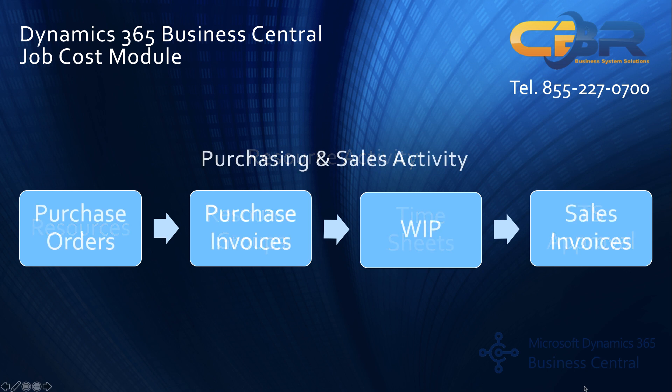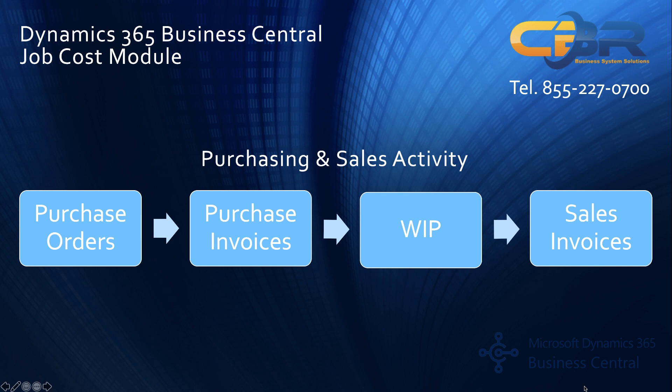Before we dive into the actual product I'd like to go over purchasing and sales activities as well specifically purchase orders and purchase invoices that may be related to a job. So when you issue purchase orders you have the ability to track a particular line on a purchase order to a job and a job task line which is a step within the job. You can do the same for regular purchase invoices as well.